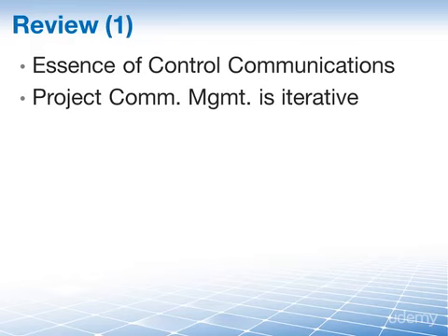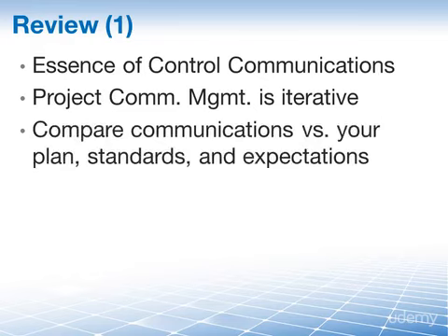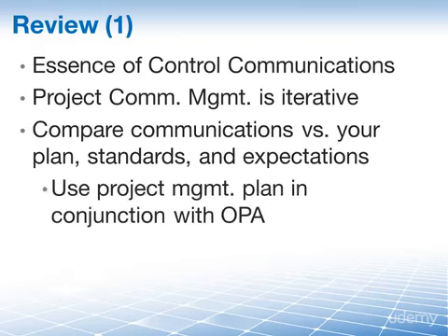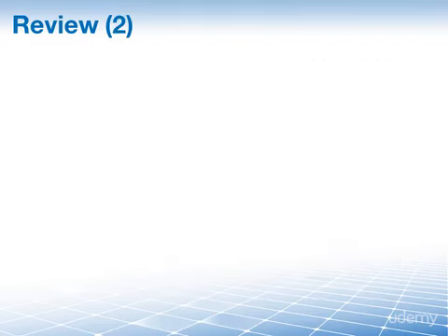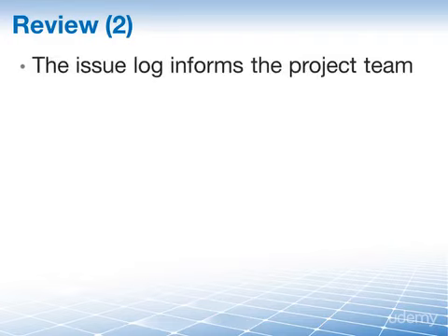of your communications processes. In controlling communications, you need to compare communications against your plans, standards, and expectations. In order to do that, you need to understand your objectives and standards for communications. You use the project management plan in conjunction with your organizational process assets for this purpose. Then you can examine project communications and work performance data to see how you are doing. In addition, the issues log can inform the project team about issues with communications or may give you insight into other areas which may need to be communicated differently.